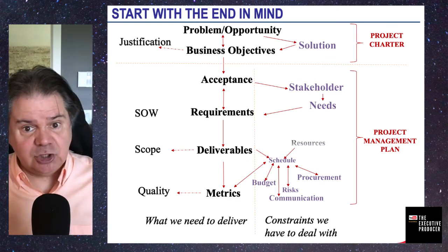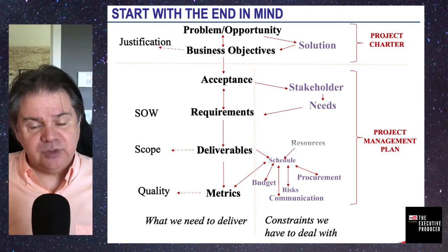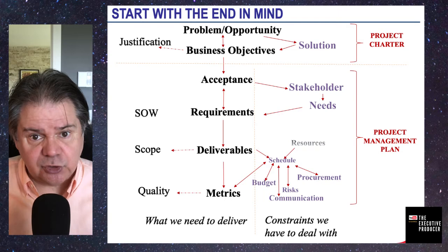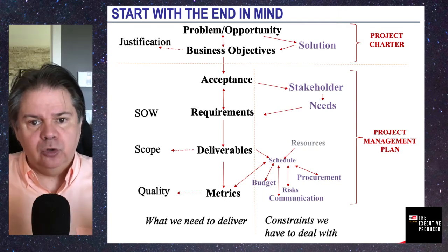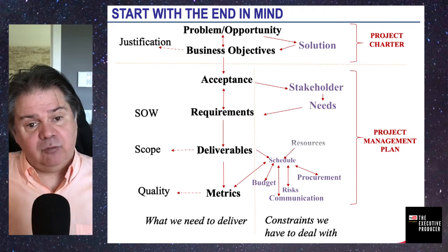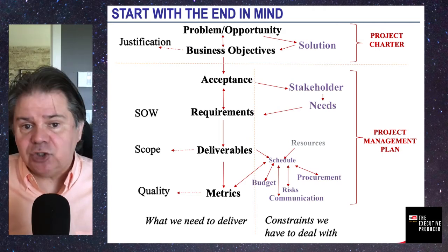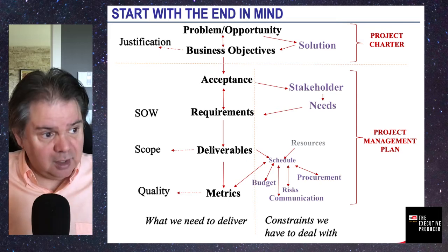Risk, mitigation, contingency, or plan B, all of this requires resources also and needs to be inserted in the schedule, so you also reflect these activities, and it reflects in your budget, the cost of doing risk management. Mitigation costs a lot of money. Okay, it's part of the game.